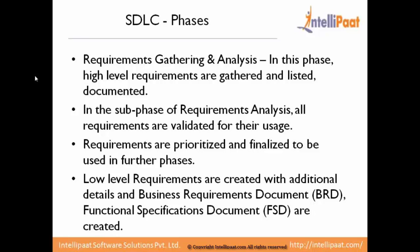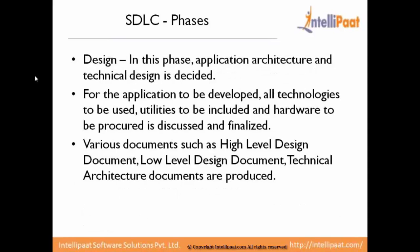When documenting high-level requirements, the artifacts required to be produced are called BRD, FSD, or similar. BRD stands for Business Requirements Document and FSD stands for Functional Specifications Document. Requirements gathering covers high-level requirements, while the analysis phase covers questioning those requirements, asking detailed questions, validating all requirements, and documenting them into artifacts like BRD and FSD.